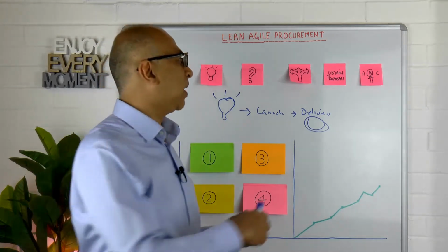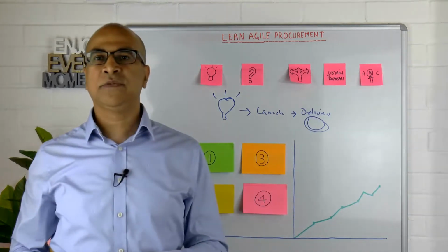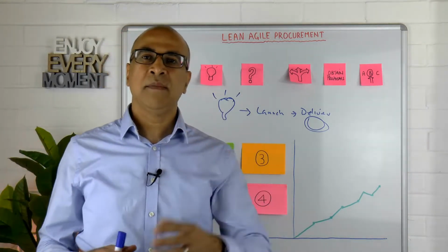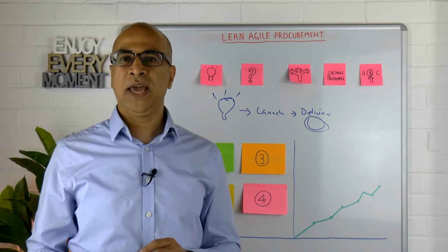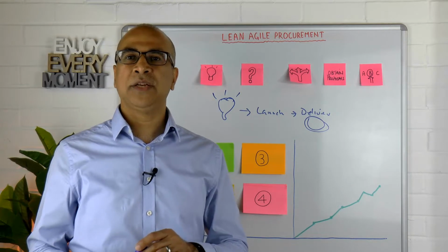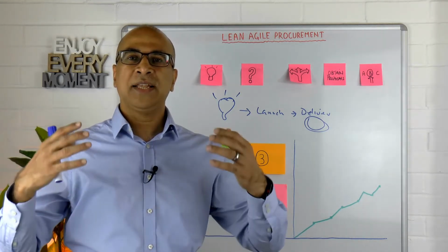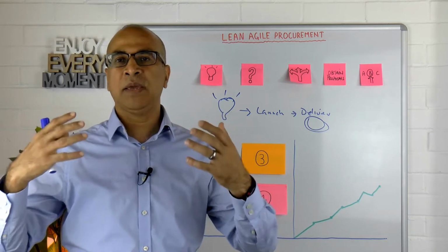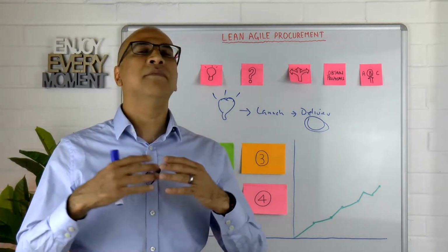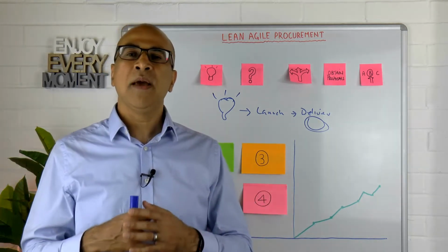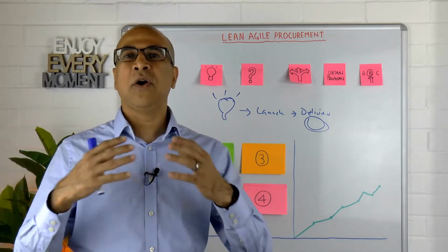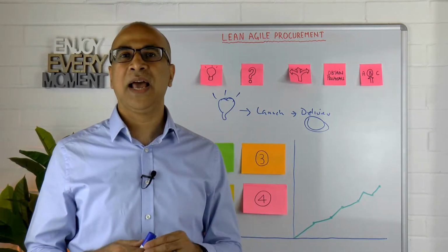For example, if I go out and get different proposals from suppliers A, B, and C, and I like one part of the solution from supplier A and another part from supplier B, I then need to go out to each of those suppliers separately and guide them towards what I'm actually looking for. That can add weeks or even months onto the process. Why? Because we're doing it disparately, we're doing it sequentially. There's a long lead time for all of these different aspects.